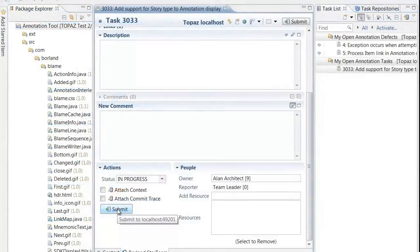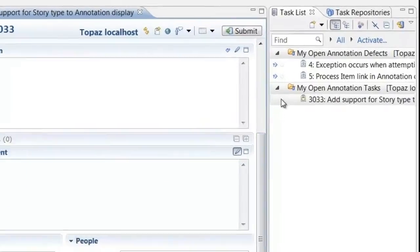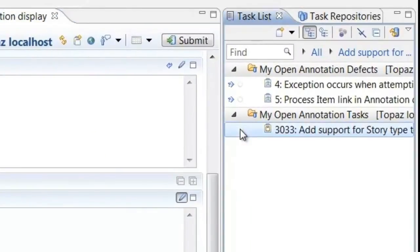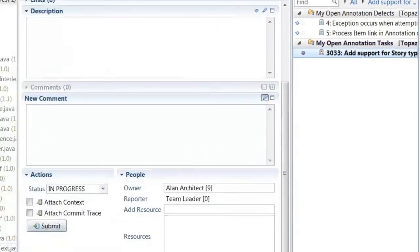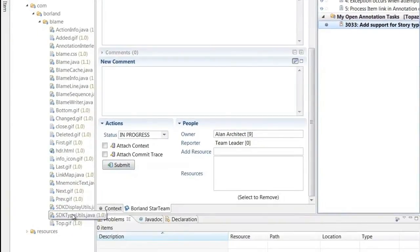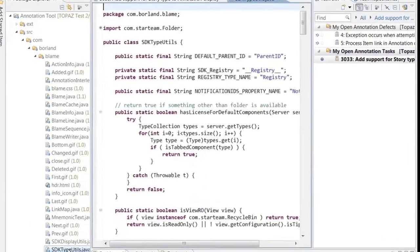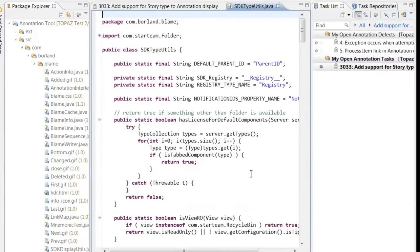When a developer is ready to work on a task, they simply set it to active and begin editing source code, while their time and context are being tracked automatically.